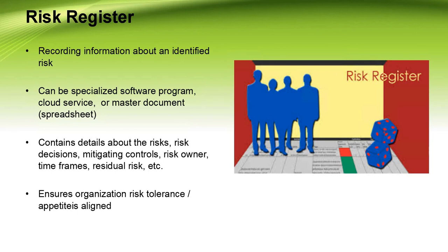Normally, common content of a risk register includes a few important things. One is a risk category, a categorization group. Second is the name and description of the risk. Third is the measure of the risk through a risk score. Fourth is the impact to the organization if the risk is realized. Fifth is the likelihood of the risk being realized. Sixth is mitigation control and residual risk. The last one is contingency plans that cover what happens if the risk is realized.